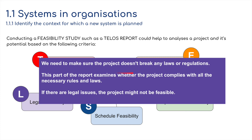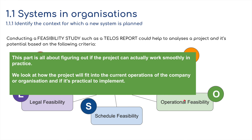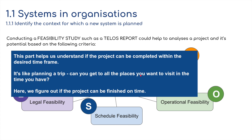For legal feasibility, we need to make sure the project doesn't break any laws or regulations. This part examines whether the project complies with all necessary rules and laws — if there are any legal issues, the project might not be feasible. For operational feasibility, we look at how the project will fit into the current operations of the company and if it's practical to implement. Finally, schedule feasibility asks whether we can do everything we want in the time frame available — like planning a trip, can you get to all the places you want in the time you have?